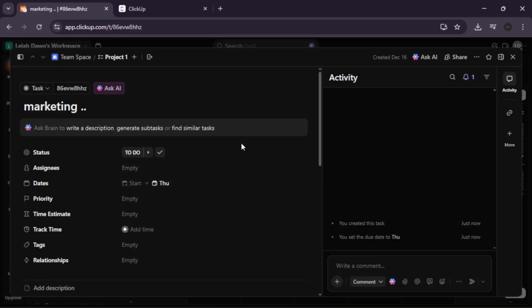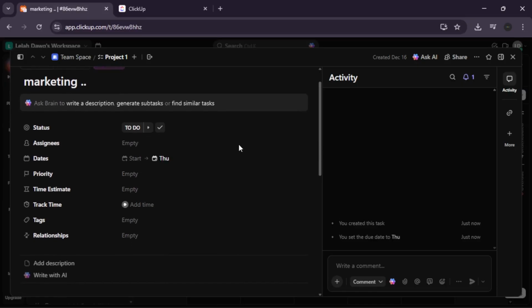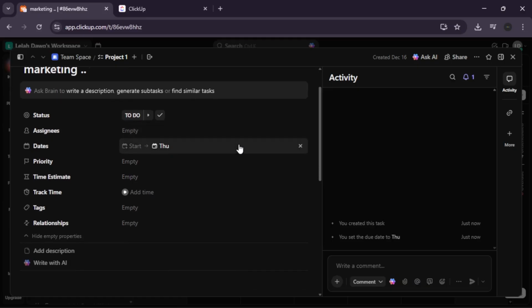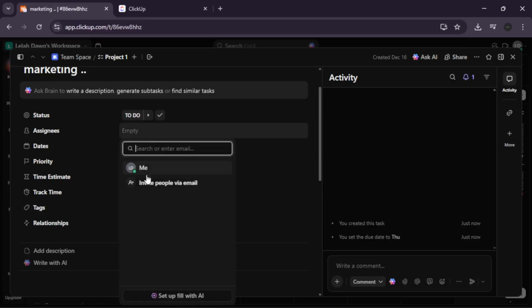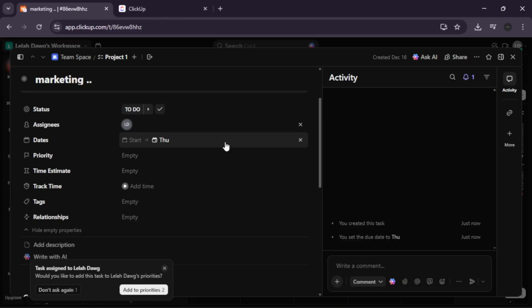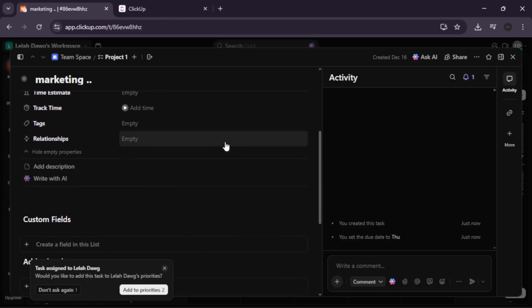Set Agenda. Transform discussion items into trackable work by adding subtasks for agenda sections or creating a checklist for talking points and follow-ups. Assignees. Assign the task to primary participants and team members who are responsible for the meeting. Watchers. Add others as watchers if they only need read-only access and visibility, such as observers or stakeholders.